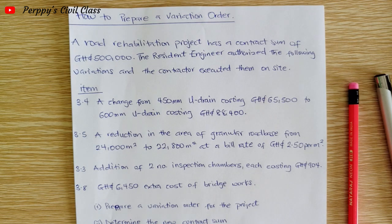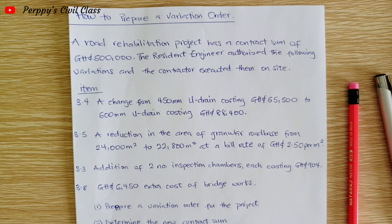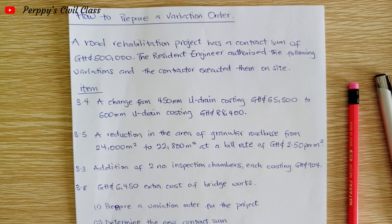Welcome to Peppy Civil Class. Today we will be looking at how to prepare a variation order. A variation is simply an adjustment in the cost of work arising from site changes, including the increase, decrease, omission, change in quality, change in position, change in dimension, or even demolition of any part of work under a contract. The engineer can order the contractor to construct it and there is a need to prepare a new variation order.